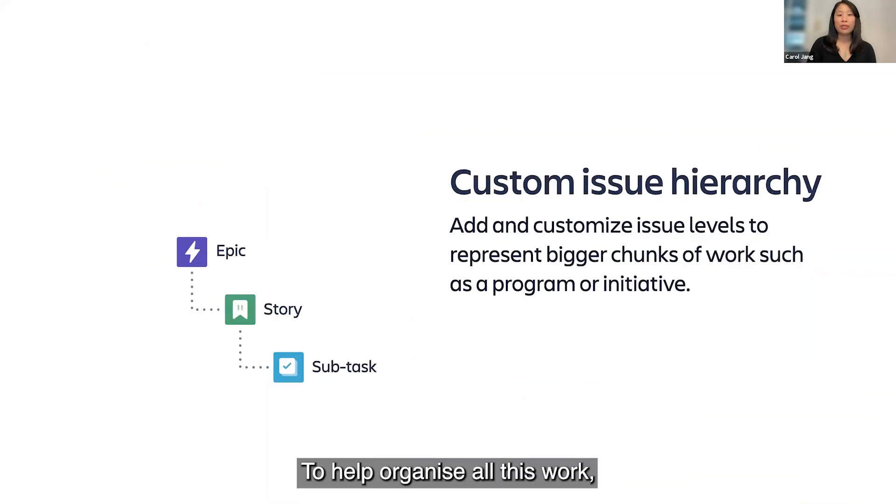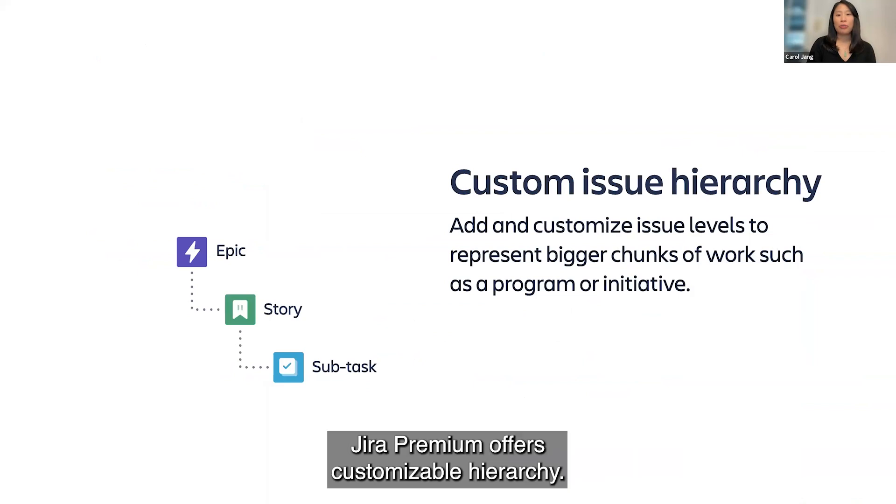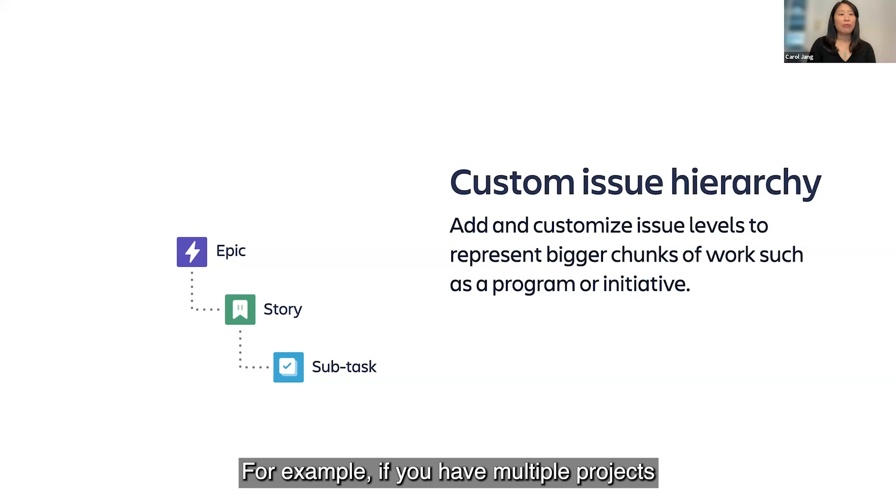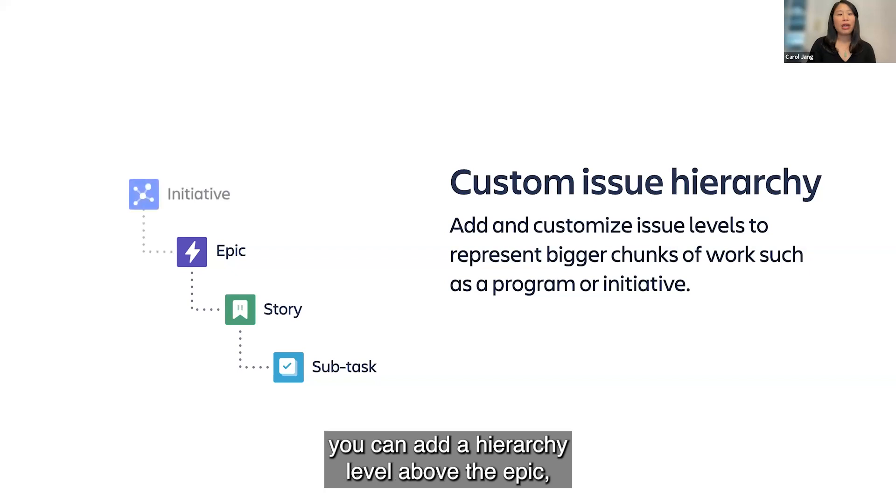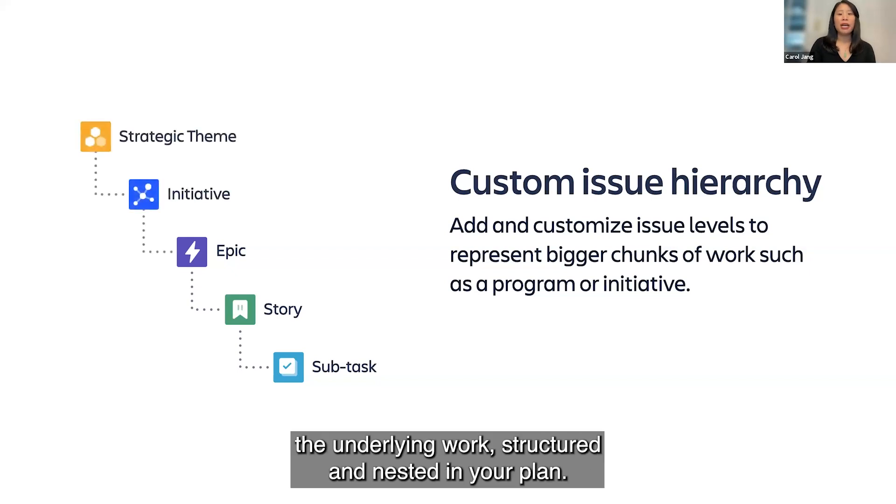To help organize all this work, Jira Premium offers customizable hierarchy. For example, if you have multiple projects and teams contributing to a program, you can add a hierarchy level above the epic to see underlying work structured and nested in your plan.